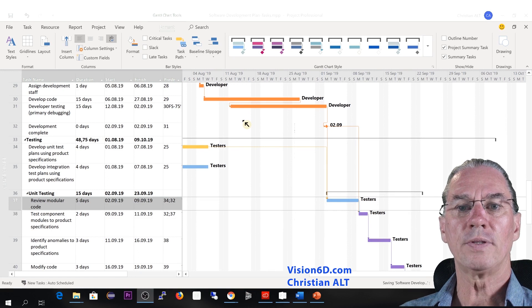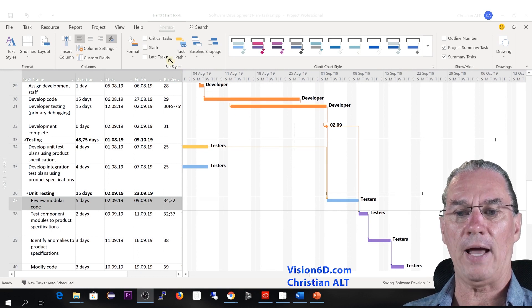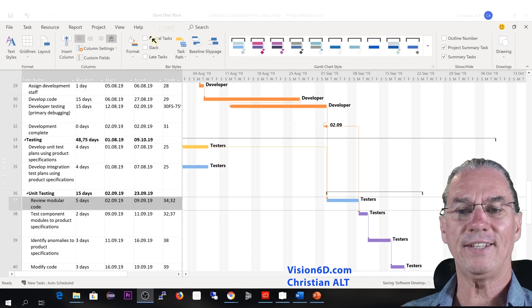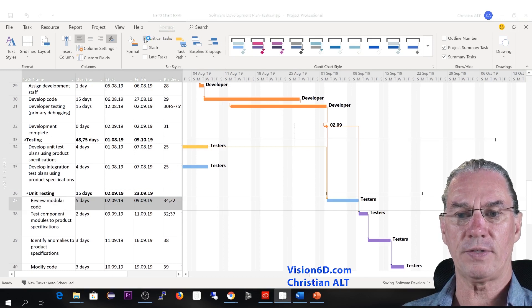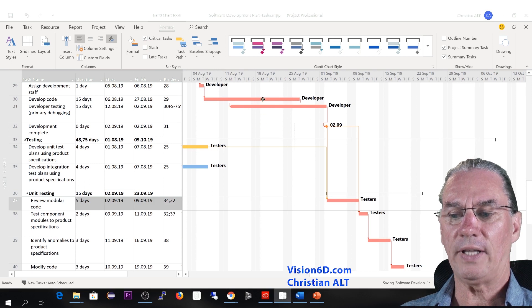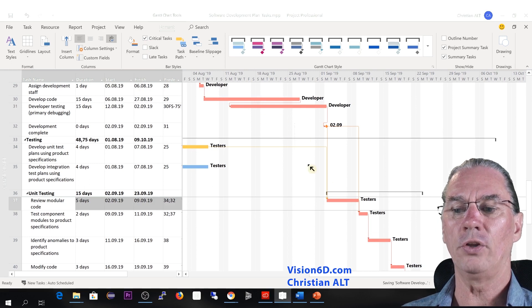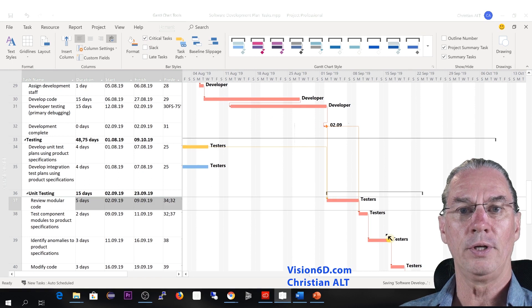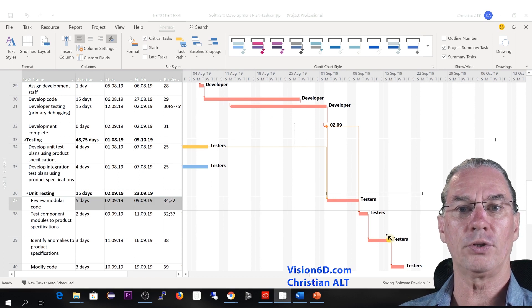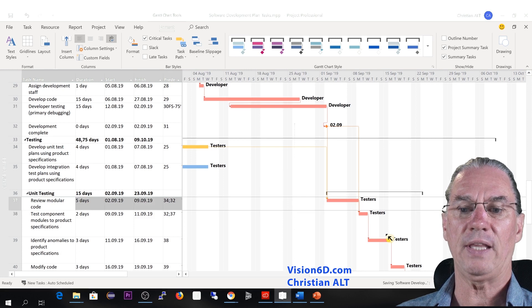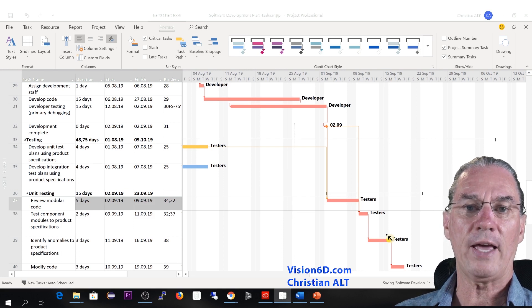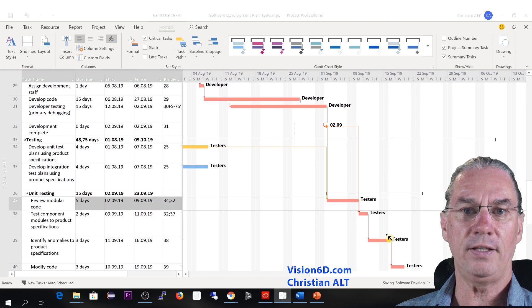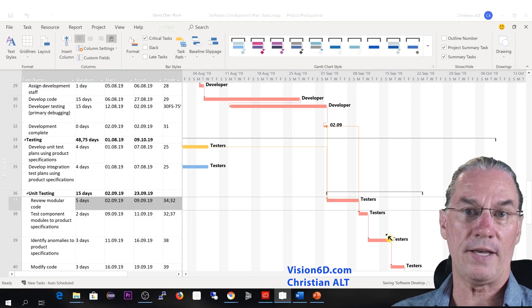What happens now if you want to look at the critical path? So into format here, you select the critical path checkbox. And you see now that all the tasks on the critical path have changed color. So it's preceding on the task. What I want to say is that critical path showing up has priority on any other task link or task path.